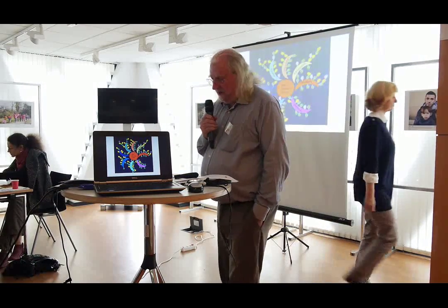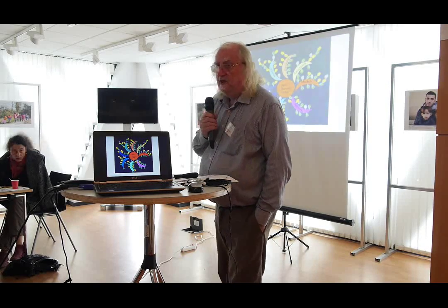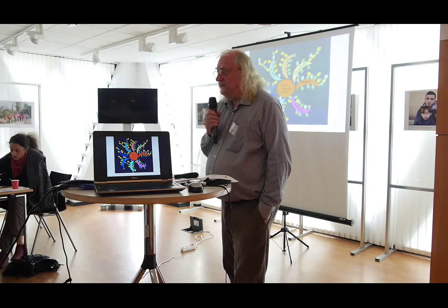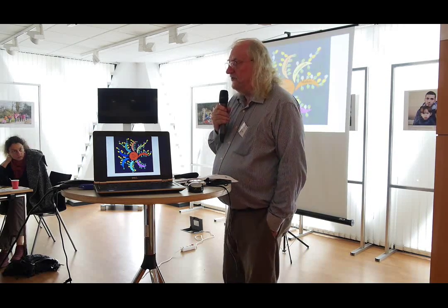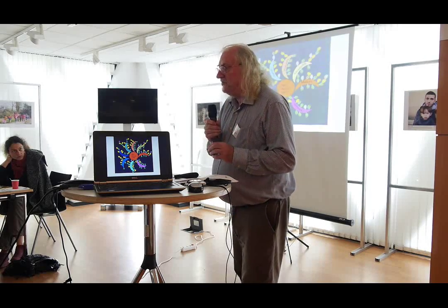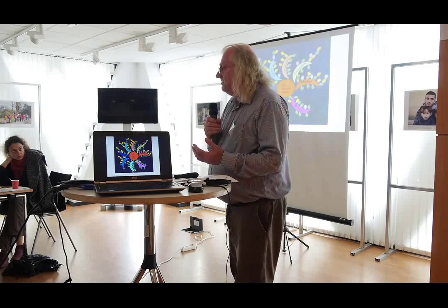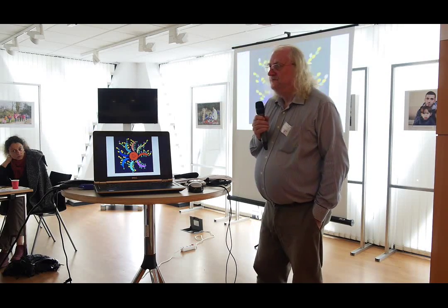So it's a little bit like producing the work breakdown structure you did this morning. It's about the ideas, it's about the things that need to be done. It's not yet about the detailed planning, the order of things to be done, how they relate to each other. It's really a brainstorming stage to get everything that needs to be done at this point. Any questions?